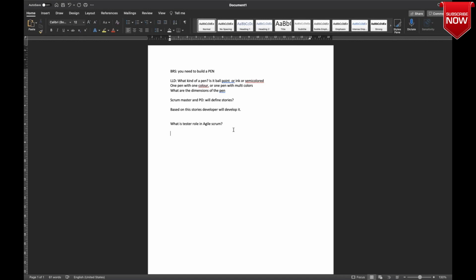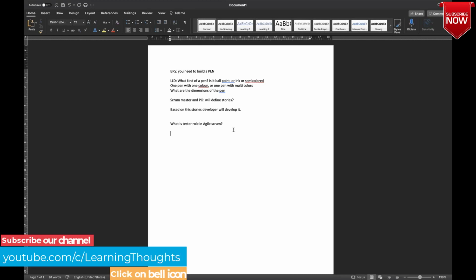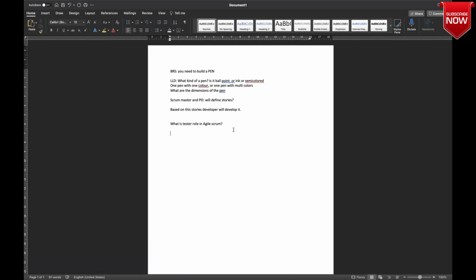There are other companies which follow the traditional Scrum, where you have, for example, a 1:2 ratio. It means for every 2 developers you have 1 tester. This is a traditional Scrum calculation. But now there is a different trend where you have multiple chunk teams. For 3 developers you have 1 tester, or for 4 developers you have 1 tester, who will be doing the manual testing part, not considering the in sprint automation.